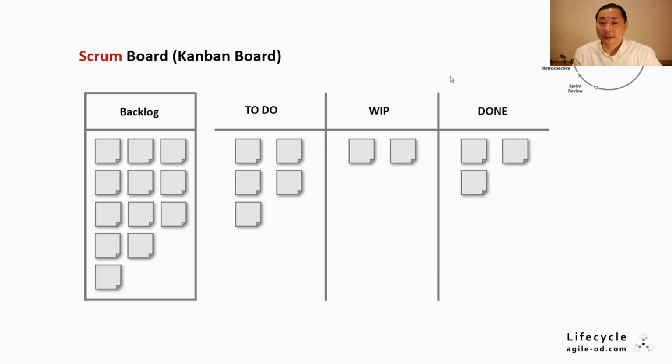The sprint backlog is commonly visualized in the form of a Scrum Board, also known as a Kanban board, a concept originating from Lean. The Scrum Board is not an artifact mentioned in the Scrum Guide, but is now ubiquitously seen in all Scrums. It's a simple board consisting of to-do, work in progress, and done boxes, but it's a powerful tool that provides persistent visualized sharing of information to the Scrum team and stakeholders. It's also a good tool for observing the practice of definition of done on product backlog items, which is a requirement by the Scrum Guide.